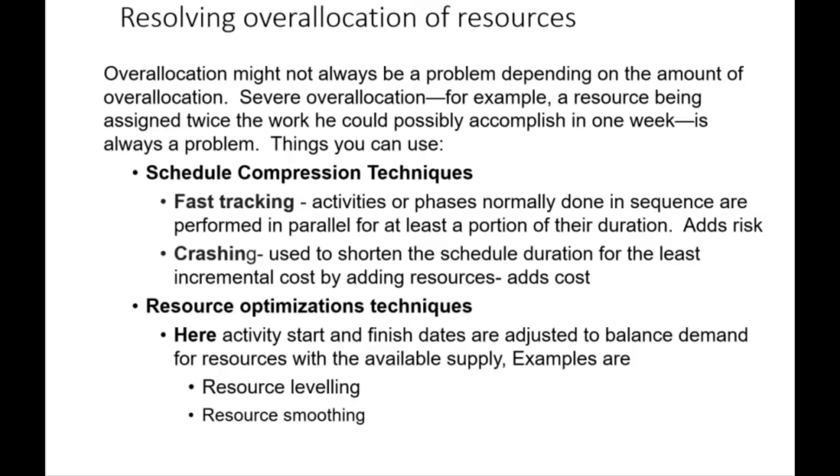One of the things I wanted to say earlier is that over-allocation might not always be a problem depending on the amount of over-allocation. Severe over-allocation, for example, a resource being assigned twice the work you could possibly accomplish in one week, is always a problem. So what can you do?